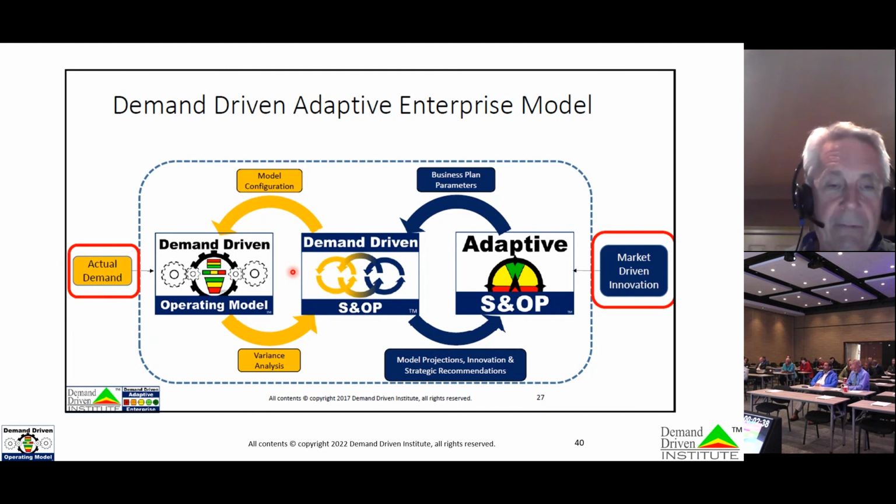If we know that that rate of this most critically constrained material is, say, 5,000 units a month, then we can also pace our buffers and size our buffers accordingly. If we keep driving our planning based on our forecast, guess what's going to happen? We're going to be in a supply constrained environment and our inventory is going to be going up. And how the hell can that happen if we're supply constrained?